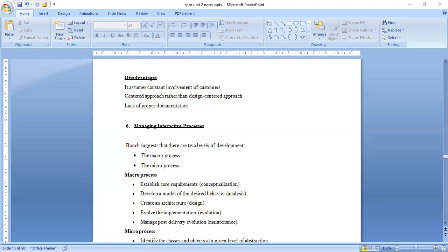Norden studied the staffing pattern of several R&D projects. R&D is nothing but research and development projects. He found the staffing pattern of R&D projects to be very different from manufacturing or sales type of work. So he found the categories of different teams working under the development process. Okay, staffing pattern of R&D types of projects changes dynamically over time for efficient manpower utilization. He concluded the staffing pattern for any R&D project can be approximated by the Rayleigh distribution curve. So this is about Norden's work, and next one is Putnam's work.